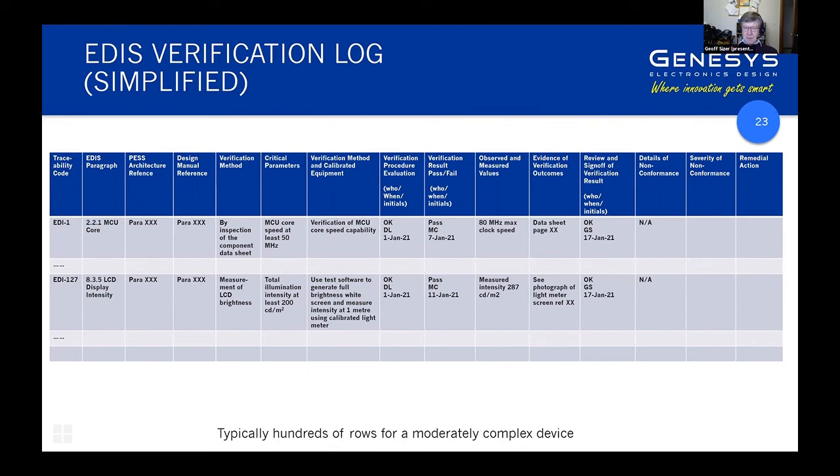And following through, note that if you have a non-conformance, you need to identify it, assess its severity, and then propose remedial action to fix it. This occurs at every step in the process, but it's best to pick this up in pre-compliance. If you pick up non-conformities in your formal compliance process, it opens up a world of pain, because you then have to cycle back through this whole process for that requirement, and also make sure that whatever you've done to fix it hasn't broken something else.